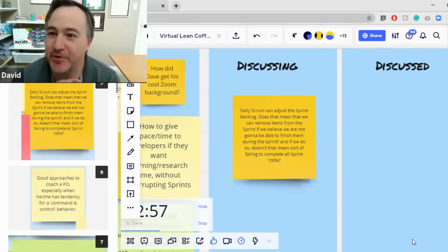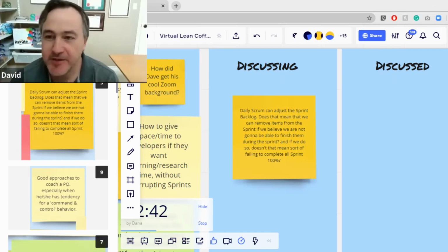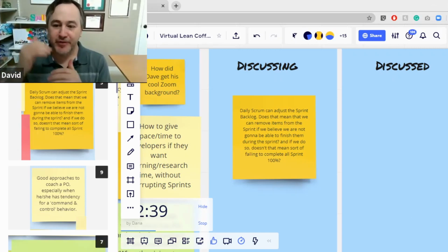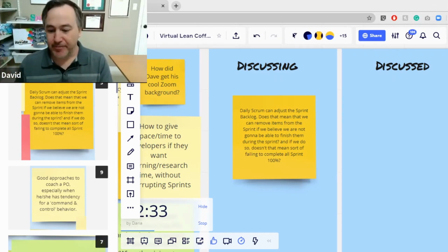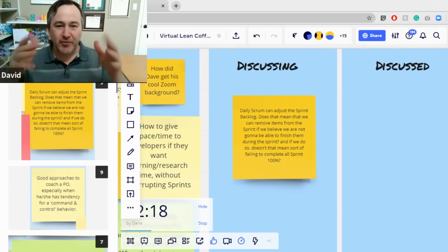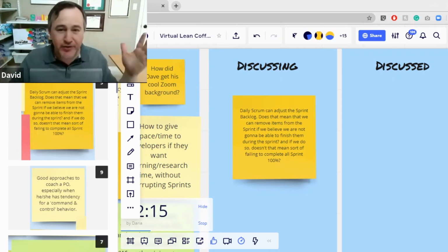Yeah, I think I can share an example here. The sprint goal is not just the sum total of product backlog items or tasks in the sprint backlog. The sprint goal could be, for example, something like, in this sprint, we really need to improve the login experience, because that's perhaps where we're getting the greatest amount of feedback from our customers or our users, that they're struggling to log in. The forgot password thing is really clumsy, and so on. And so from that goal, we might derive some tasks and take on too much work.